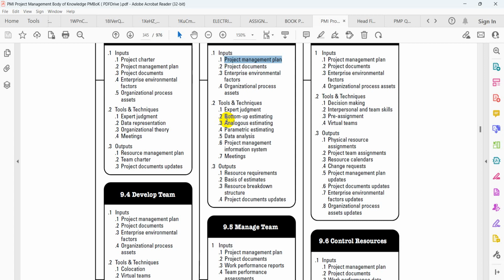So you need to estimate how many people do we have at the bottom here? There are 10. Okay, how many do we have in this group? 20. Then you go until you get the total number up here. It's the same as working against the resource breakdown structure, but not coming down, but going up. But in the end, the total number there should add up. All these working in small activities there.